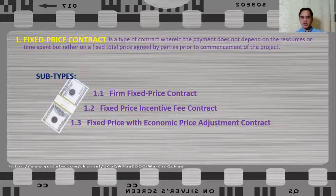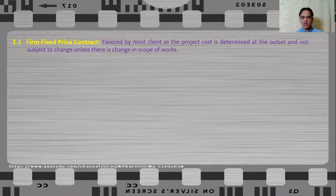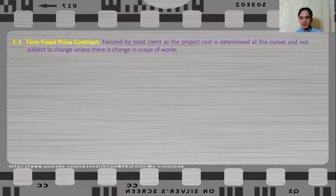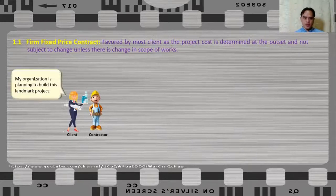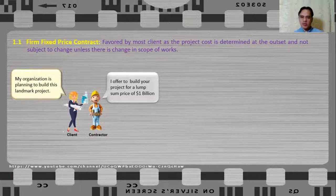For a firm fixed price contract, this one is favored by most clients as the project cost is determined at the outset and not subject to change unless there is a change in the scope of works. The total amount will be agreed and this is the only amount that will be paid. For example, the client is planning to build a landmark project and the contractor offers to build it for a lump sum price of $1 billion — the total amount the contractor will be paid regardless of how much resources are used.